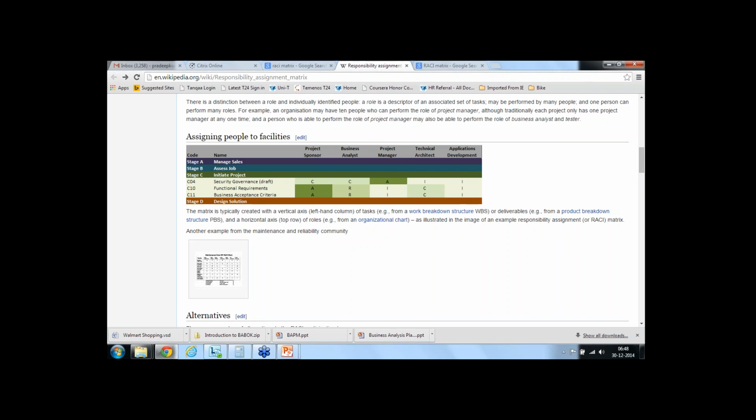And whenever a business requirement document is published, it will go through various iterations. That means they may have consulting workshops with various stakeholders, and they may get inputs, and all these inputs will be recorded, and subsequent action will be taken on whether you need to update the BRD to accommodate them. Based on this, you will update the document, and every update will have version information. So when you work on any document, you need to always have version information, so that when your document goes through the first iteration, the second iteration, your version changes.